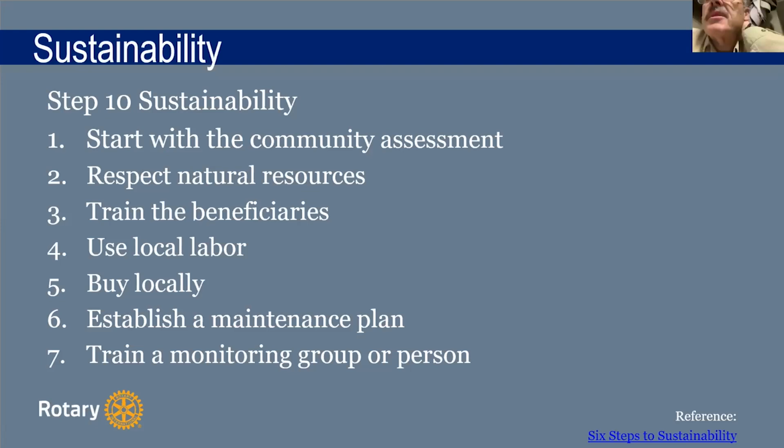All right. One of the reasons that this process is becoming more and more complex is that about 10 years ago the Rotary Foundation made a discovery that over 50% of the WASH projects being installed by Rotarians failed within 5 years. So that's why the word sustainable is such an important element. And one of the things that I've heard they're pushing, and I've experienced it, is they want you to hang out for more than one project, for more than 1 year, go on to the next step of health or something like that, so that you can keep an eye on, especially the technical projects like a water well, and make sure that everything does progress as you thought it might. Because boy, Murphy's Law bites you every time if you don't keep an eye on it.